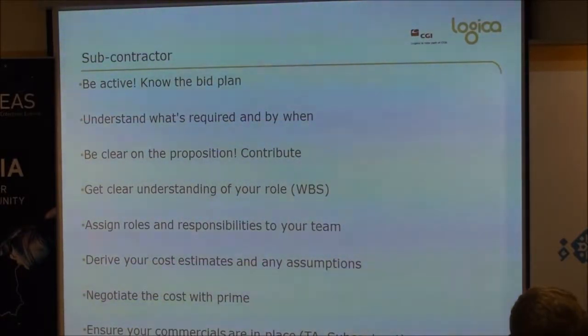Ensure all the commercials are in place. So you've got a teaming agreement with them. It states what is expected from you, i.e., what documents you're going to output, as clearly as possible, and what assumptions you've placed on that will go eventually into the financial proposal. Because sometimes you will have to make assumptions. And as long as those are clear to you, that's fine. But you all need to know, otherwise you could get into a problem later on. Oh, I didn't know how to do that, and oh, that's another 10K I'm going to have to spend, and I'm not prepared for it.